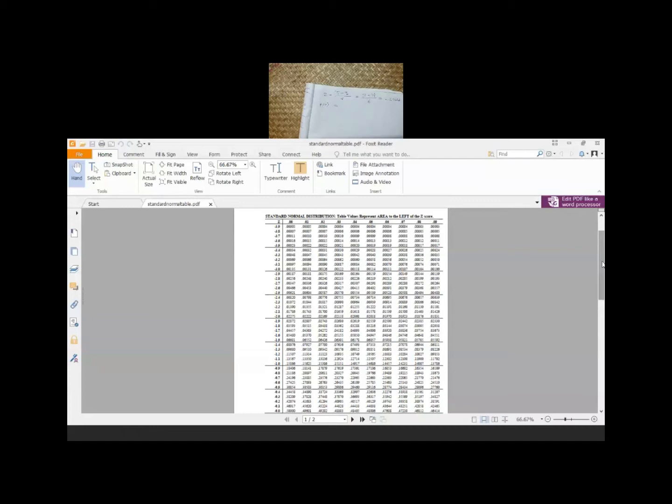Okay. Then our z value is minus 2.166. So we will convert the value to two decimal places. So this becomes minus 2.17. This is the general rule. Now if you look at the left of the table, you will find minus 3.9, minus 3.8, minus 3.7.